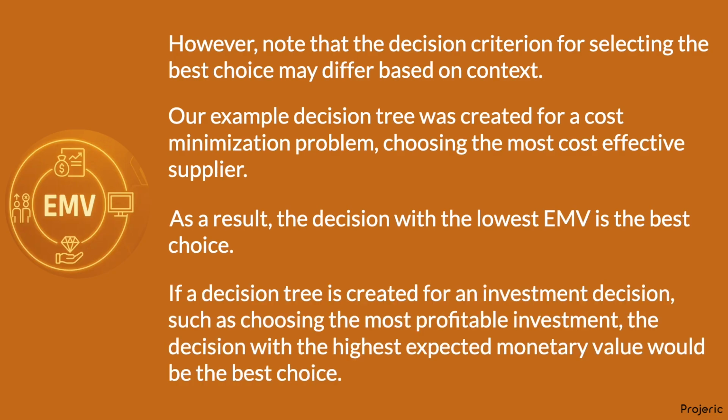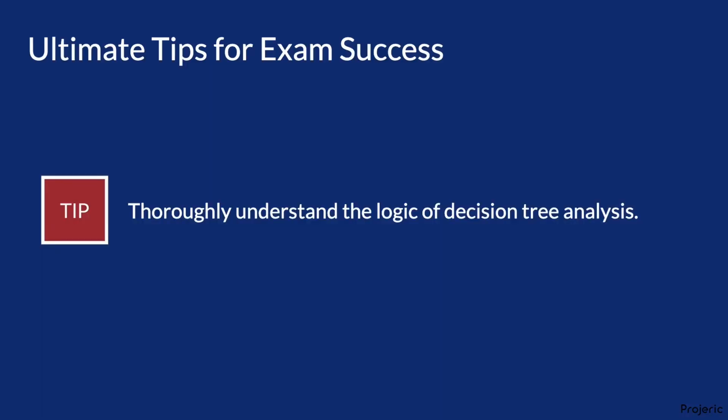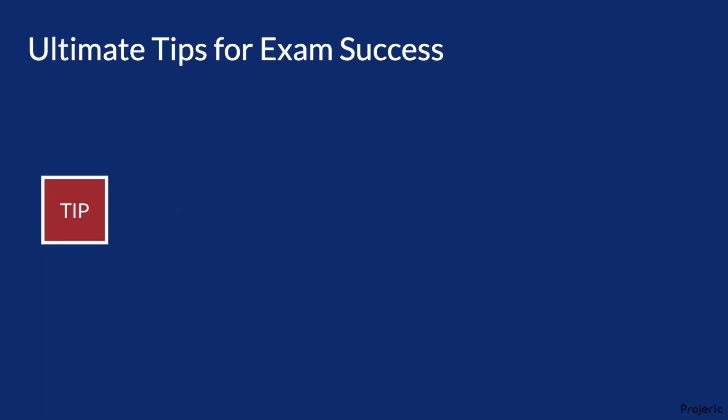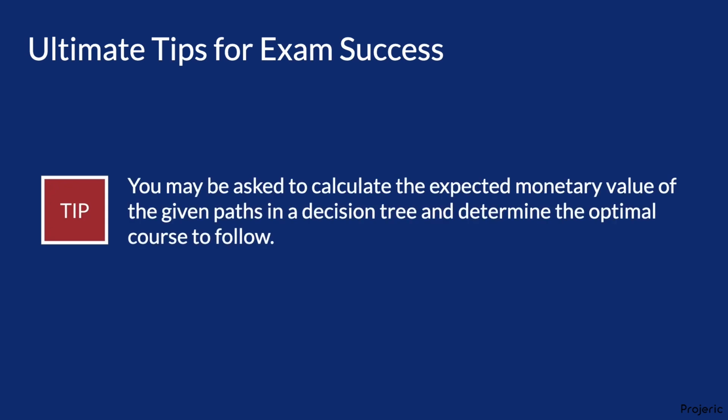If a decision tree is created for an investment decision, such as choosing the most profitable investment, the decision with the highest expected monetary value would be the best choice. Lastly, let's take a look at the ultimate tips for exam success. Thoroughly understand the logic of decision tree analysis. You may be asked to calculate the expected monetary value of the given paths in a decision tree and determine the optimal course to follow.